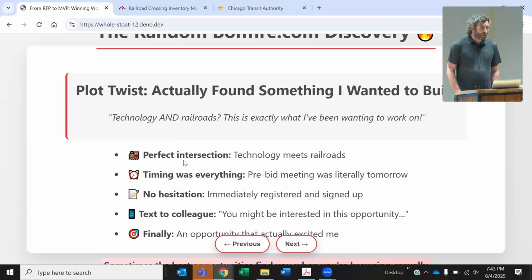Basically, it's a vital logic validation, V&V, verification and validation, and you can run the same applications that you put in the field in the PLCs, basically, in the vital logic controllers that move the trains through. You can run that on their application, and it's the exact same runtime as it would be in the field. So you can commission it in the office before you push it. So you find all your bugs before you get out to the field, and you're 12 hours in. So it's very important, and it's quite expensive also.